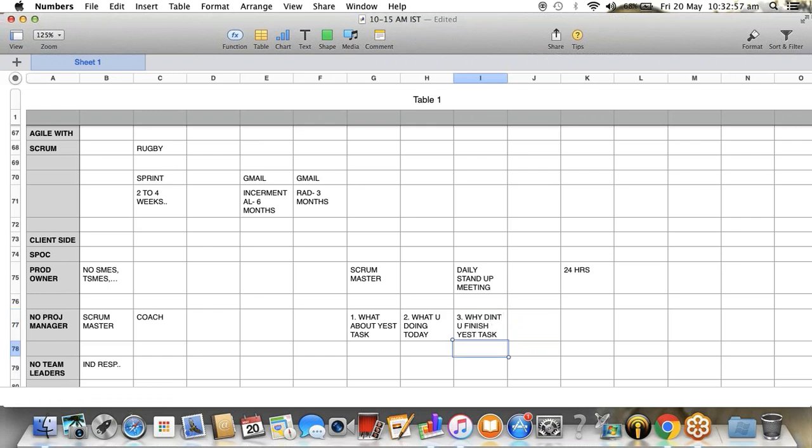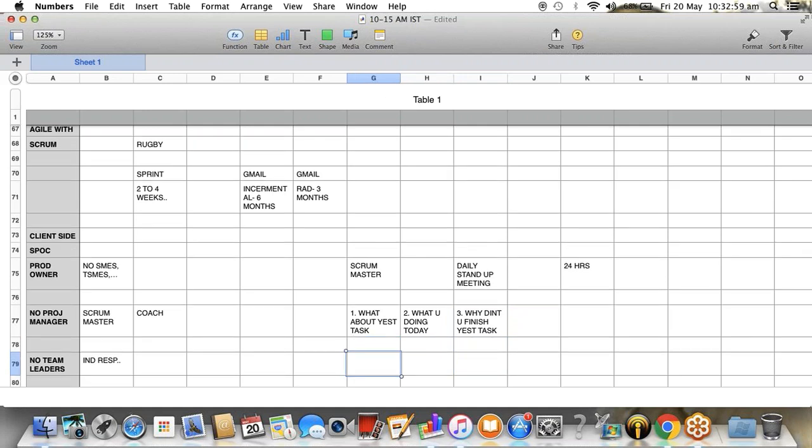Okay, three questions. Now the Scrum Master will open an Excel sheet or some type of tool they use, where they can enter all the details, like what about yesterday's task, one by one. So I say, I did ABC because yesterday I promised that I will do ABC. So today I finished that. Then, what are you doing today? The Scrum Master will make a note. I will do DEF.